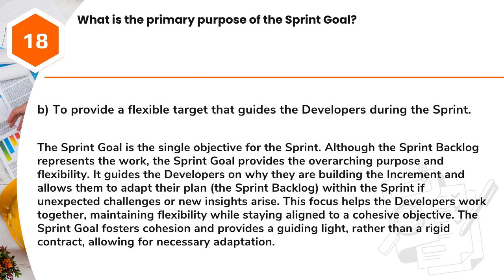Answer: B. To provide a flexible target that guides the developers during the sprint. The sprint goal is the single objective for the sprint. Although the sprint backlog represents the work, the sprint goal provides the overarching purpose and flexibility. It guides the developers on why they are building the increment and allows them to adapt their plan, the sprint backlog, within the sprint if unexpected challenges or new insights arise.